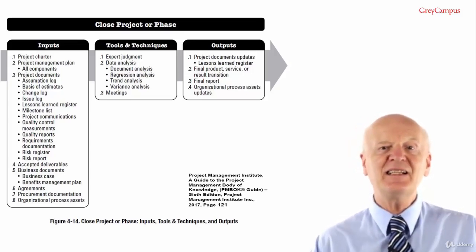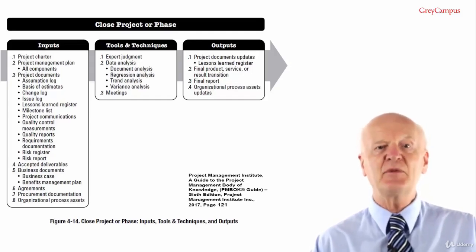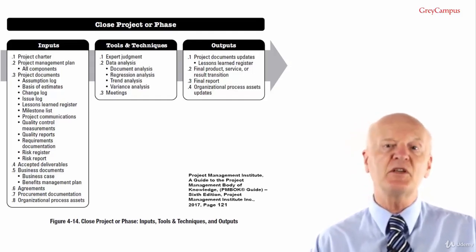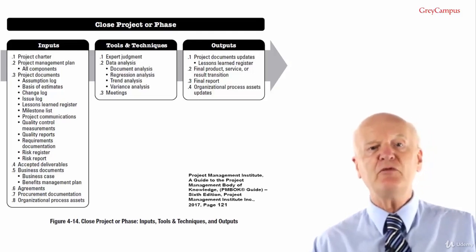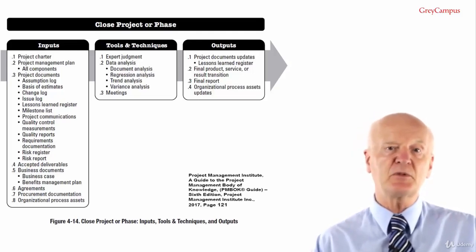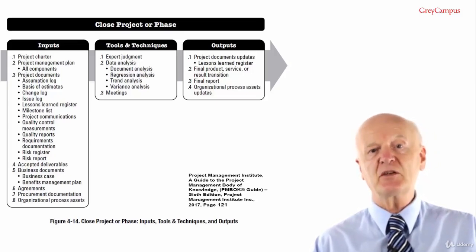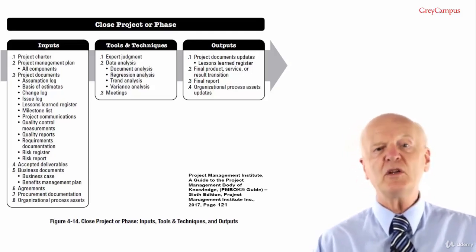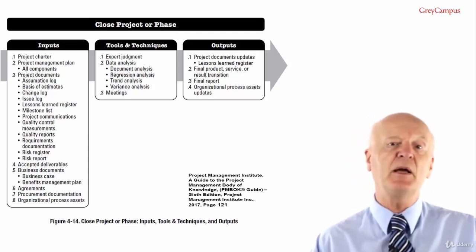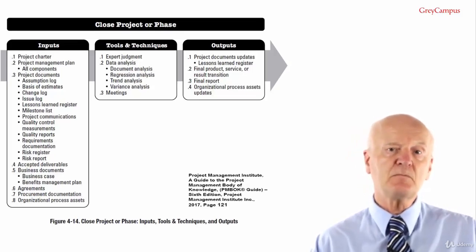However, in the case that the project was failing and was closed prematurely, the formal documentation will record why the project was terminated and formalises the procedures for the transfer of the finished and unfinished deliverables of the cancelled project to others, as well as return to stock or sale of unused materials, or they may be passed to the customer depending upon what the agreement was.